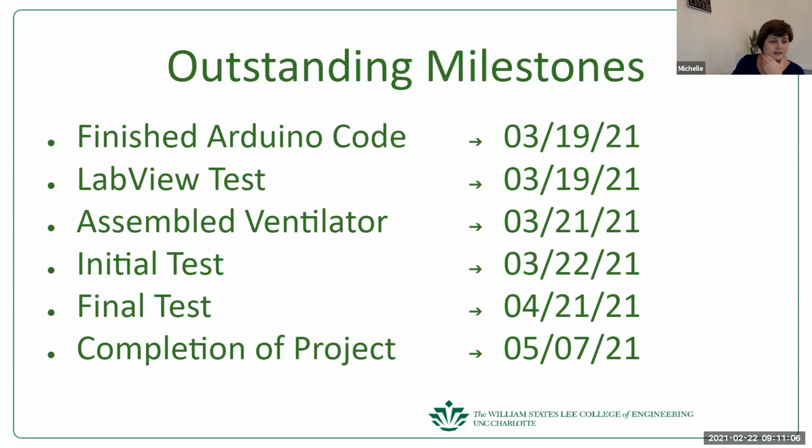I just want to make sure we leave enough time for debugging and testing. And at least I think what you're not showing on here is that before bullet 1, you're doing a fair amount of test and debug and integration between Arduino and LabVIEW before the 19th. That's happening this week, next week, right? Yes. Okay, good. I'm glad to hear that. Because I certainly don't want to see us bringing those two together on the 19th and assembling and expecting it all to work. Yeah, that should be starting up this week.